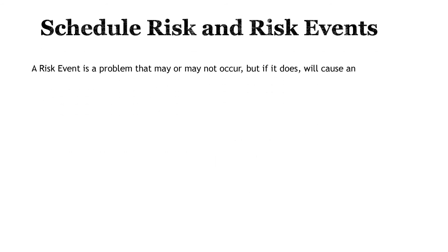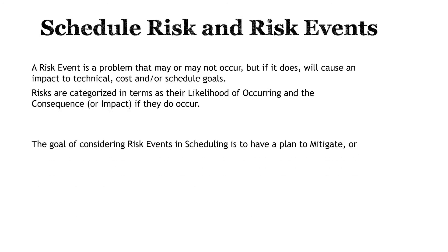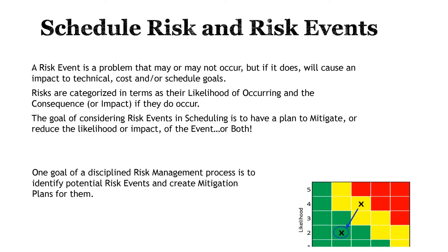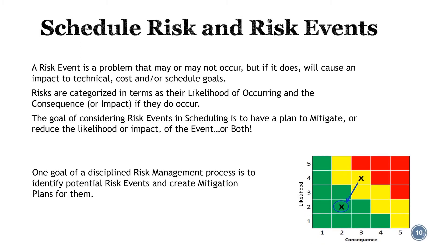The statistically-based SRA focuses on duration uncertainty in the schedule. Another source of schedule risk is unplanned project events. There are an endless set of examples for unplanned risks, such as material shortages, weather delays, and subcontracting, to name a few. Risk events are typically quantified in two dimensions: likelihood and consequence. Risk events have a less than 100% likelihood of occurring, or else they would have been planned in the baseline schedule. But if they do occur, there will be a consequence to downstream tasks, an increased cost, or a change to the technical expectations of the project. The goal of considering risk events in scheduling is to have plans in place which reduce the likelihood or impact of the event, or both. One of the primary goals of a disciplined risk management process is to identify these risk events and develop mitigation plans to deal with them.